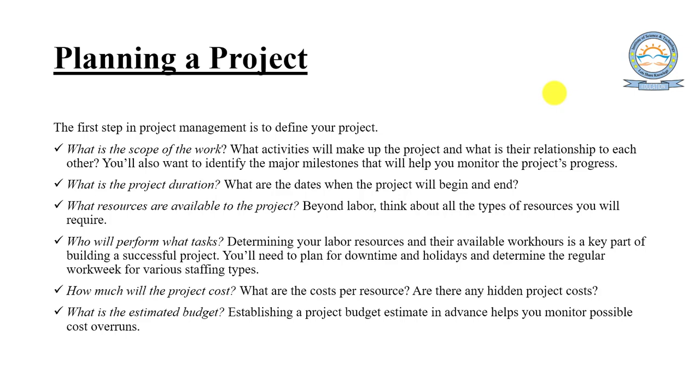And the next question is, who will perform what task? Determining your labor resources and their available work hours is a key part of building a successful project. You will need to plan for downtime and holidays and determine the regular work week for various staffing types.